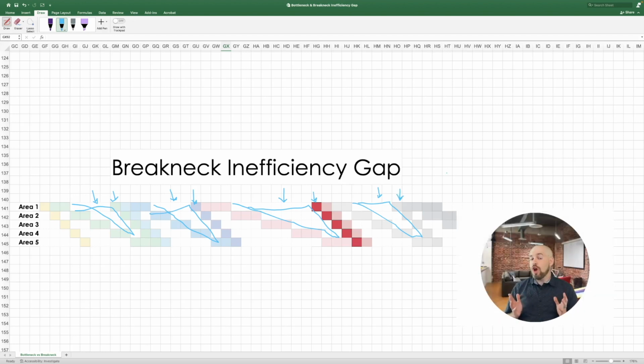So now that we know that we actually have a bottleneck, which is the slowest, and a breakneck, which is the fastest, the idea is, can we optimize the bottleneck and slow down the breakneck to get steady production? That is the key here. This is part of the leveling effort. We talk about getting production aligned and leveling the work. We might do that with work packaging. We might do that a myriad of ways. But really, a real great way to look at this is looking at our bottlenecks and looking at our breaknecks.